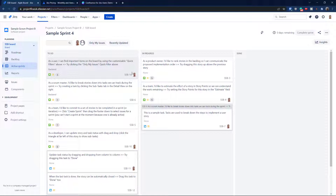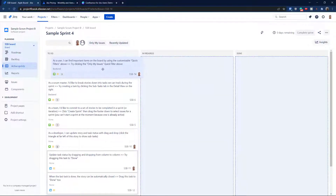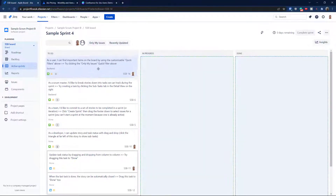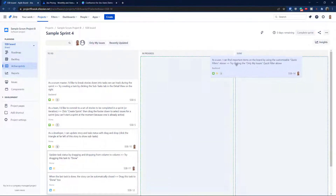Let's talk about simplified workflow and why it's connected to the board. I love simplified workflows. What it means is you can take an issue from any card — regardless of whether it's To Do — and drag it to any status. Nothing in a simplified workflow stops you from, for instance, moving directly from To Do to Done.